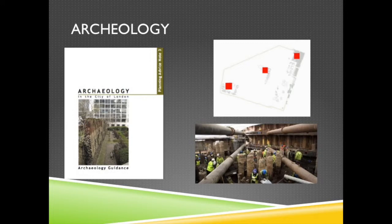Another restriction is the archaeology present on the site. An archaeological assessment has to be submitted as the proposals involve groundworks and excavations on a site with archaeological potential. An archaeological evaluation will also be required as the site has three locations of archaeological interest. We expect fieldwork to take up to at least six months prior to construction.